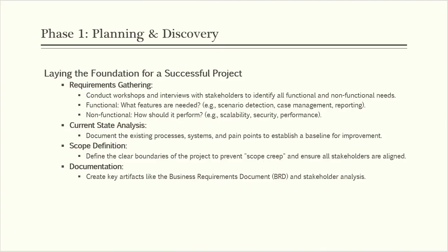In planning and discovery, we are laying the foundation for the success of the project. We should prepare the baseline document, the as-is document, and the future or to-be document, and we need to do the gap analysis. This is where we do the requirement gathering.